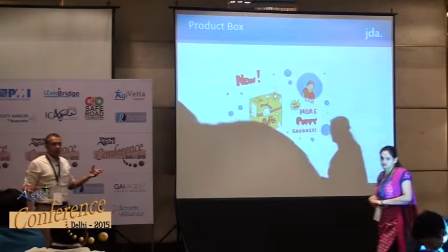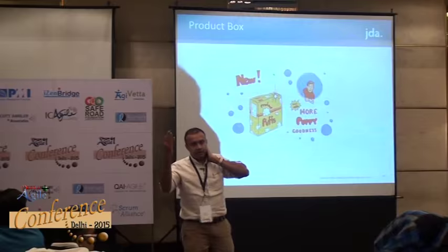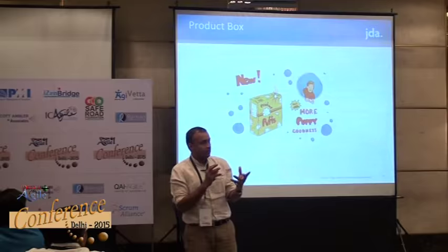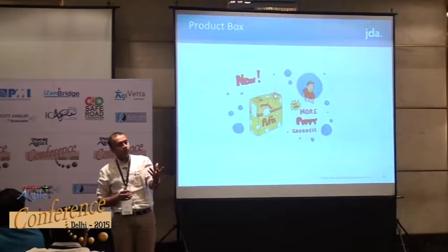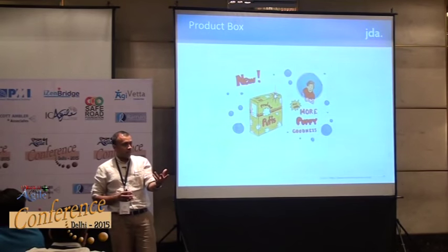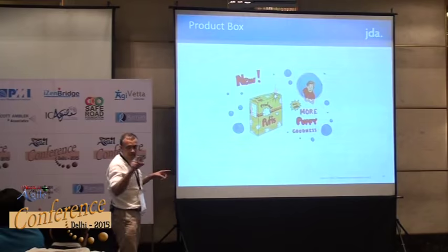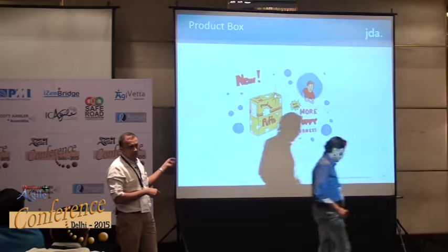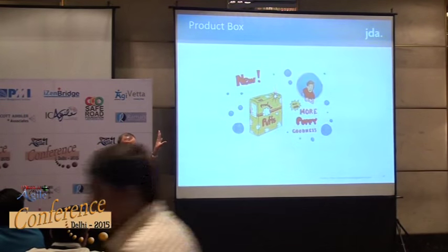And the last one is product box. Product box is more about, if you go and watch any product, or go to a shop and look at a product, there will be a funny box, right? Which describes in a nutshell what it is. So you get the customers and give them a box and ask, what do you think about this? Do you want to design this? Or your product owner can design the product box by writing down, okay, we are going to have this feature. That means it is more important. So you can play the game depending on which game you want with respect to your context. All the games are not suitable for all contexts, so you choose wisely.